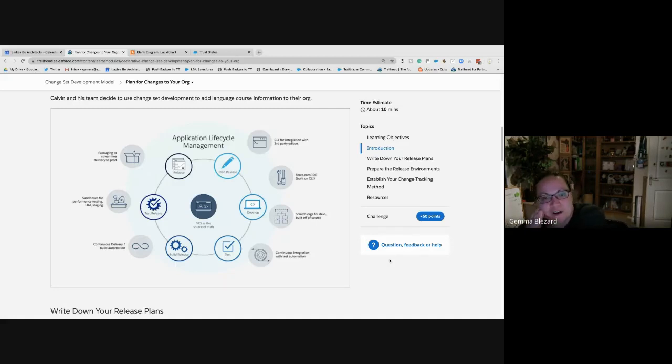You might be releasing an entire business process or several different business processes in one go. At that point, you then train and then your users go live. Whereas in an agile environment, you test and you look at how people raise a new story as a result of a test taking place, and then it gets reprioritized. And sometimes things will drop into the next sprint in favor of this new fix being reprioritized. But the idea is that that's why it's called agile, is that you can shift the priorities in response to the business's needs, and then you just release.